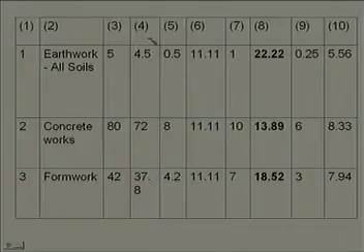Column 4 is the total cost, which if you remember we had assumed as 90% of the value. So 90% of 5 lakhs becomes 4.5. Now this 0.5 is what? Margin. It is nothing but bill value minus cost, that means column 3 minus column 4.